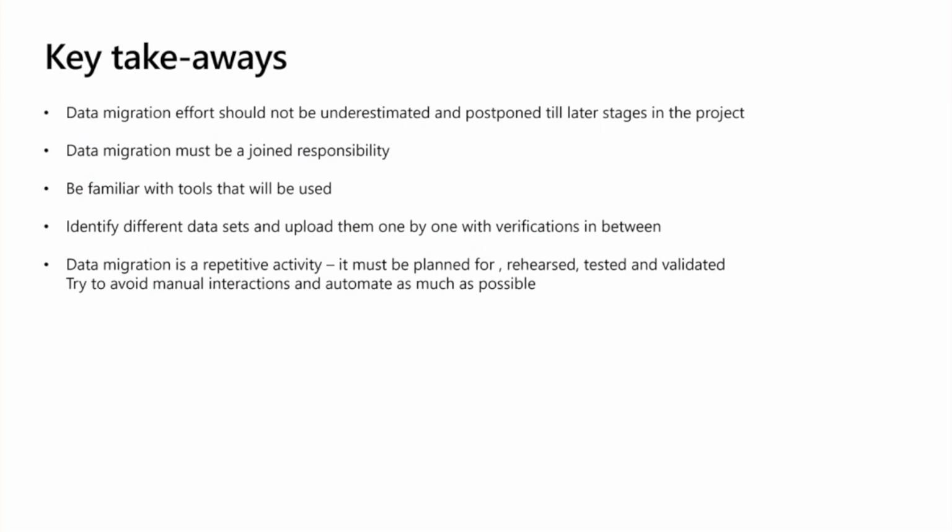such as I said, you first upload all the milestones that are ready to invoice, and then in the next step you upload the other records. So you need to identify those batches and make sure that you execute them in the right order. And you need to know that it is a repetitive activity, so it needs to show up in your project plan that you have multiple iterations of your data migration.